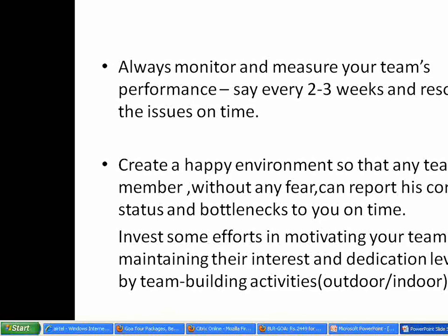And it's not only in the IT field. In the financial field, say we are financial risk managers, it's very important to visualize the future and identify the risks. Don't underestimate any risk. Small or big, you have to list down that risk and try to mitigate or reduce its impact. Normally you cannot completely remove a risk sometimes, but you can reduce the impact or reduce the likelihood of its occurrence, so that the chances of occurrence are very low. You try to have some solution for that, have some backup for that.